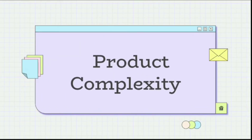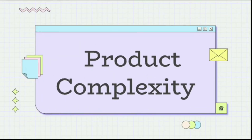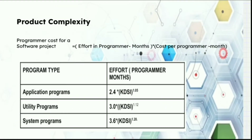Product Complexity: The effort required to develop complex software is high and hence the cost will be more. A large software product is more expensive to develop than a smaller one. The rate of increase in required effort grows with the number of source instructions at an exponential rate slightly greater than one.